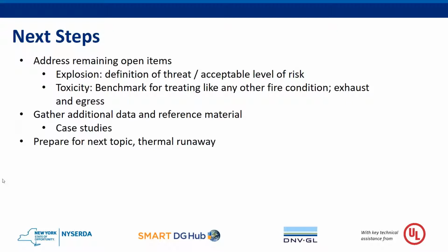But I did also want to make sure that we raised this. It was pointed out to me that there was a concern that outdoor permitting couldn't be pursued, and currently, it is. I won't lie, it's a long process to work through, but outdoor permitting is proceeding forward for energy storage systems, utilizing the guide that Derek talked about earlier. That process is in place and is occurring. Folks are receiving letters of no objection and go-ahead for installation. The work that we're doing is applicable to both indoor and outdoor systems because UL 9540A is being required for all of the systems, but outdoor systems are proceeding forward in the interim.